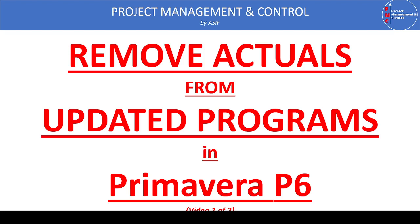I recently faced a situation where I received an update of the approved baseline program from one of our contractors. The issue is that we need to know the status of progress three months prior. At that time, we didn't have the approved baseline program or the approved BOQ, so we were using a program for monitoring and control purposes only. This progress cannot be taken as authentic because the weighted factors and costs assigned were not approved, so we cannot use it to pay the contractor.